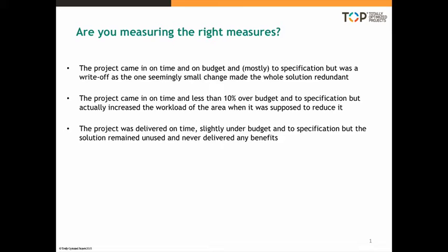The project came in on time, less than 10% over budget, and to specifications. So this is a pretty good project from those criteria, but actually increased the workload of the area when it was supposed to reduce it.